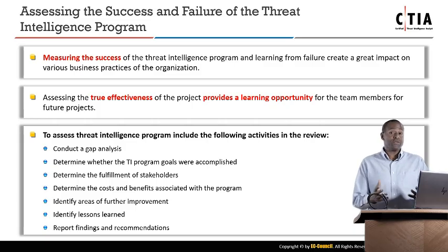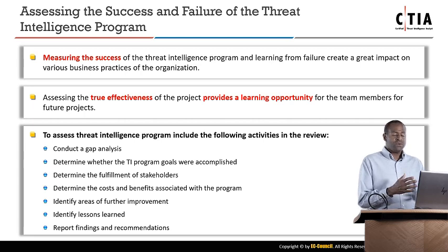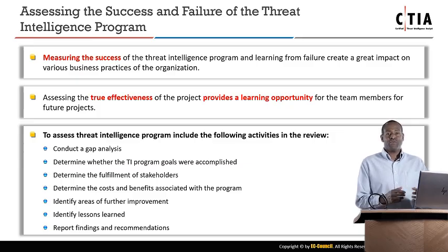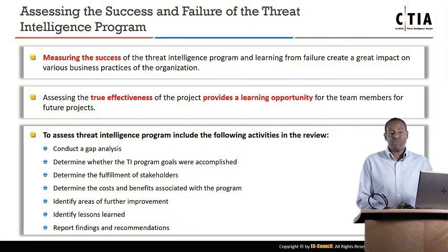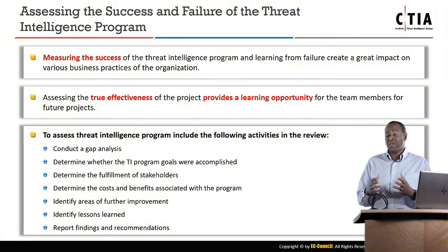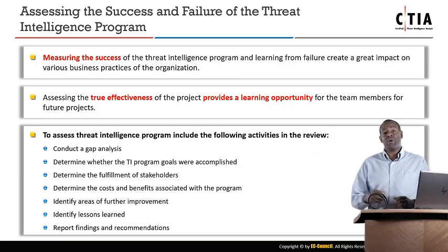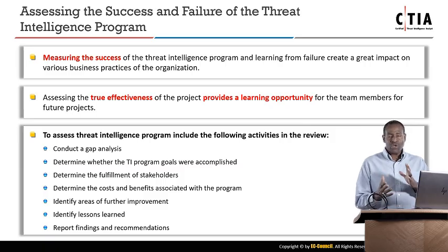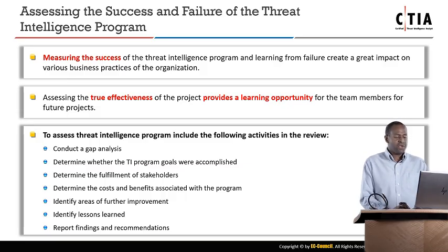What future savings? For instance, if we find that with the new program, we used to discover 5 to 10 potential long-term threats a year, and now we're discovering 500 long-term threats in a year. Can that perhaps mean that in the future we are going to save the company quite a lot? We need to elucidate that. So the gap analysis shows us from where we started to where we are, what needs to be done in the future, etc.